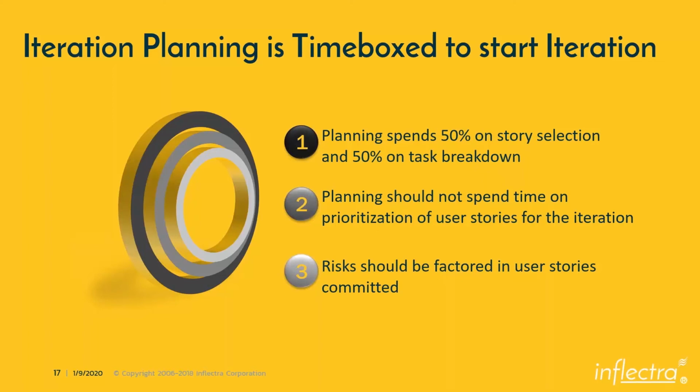The product owner should be able to say, in this next iteration, this is my focus. This is what I would like to accomplish. You can have the 60-20-20 rule or 80-10-10 rule as to how much commercial value add stories need to be given, how much time for experimentation has to be given. All those things are customizable, but at the end of the day, that has to be prioritized. The product owner should have a roadmap in his or her mind as to how the product is going to be, and the iterations are going to map to multiple releases.